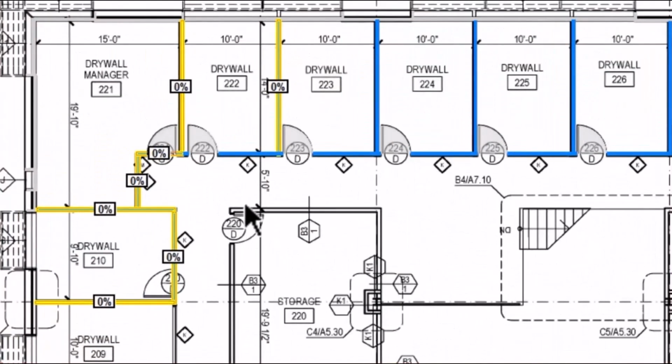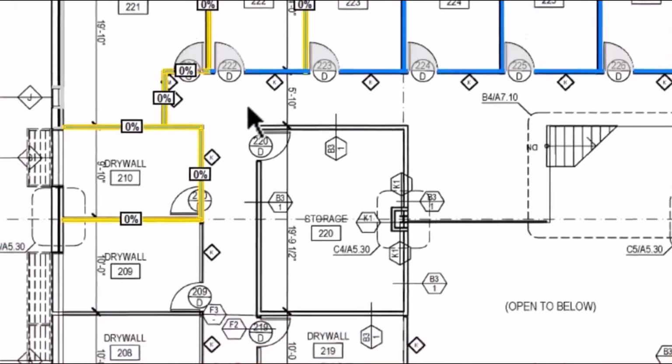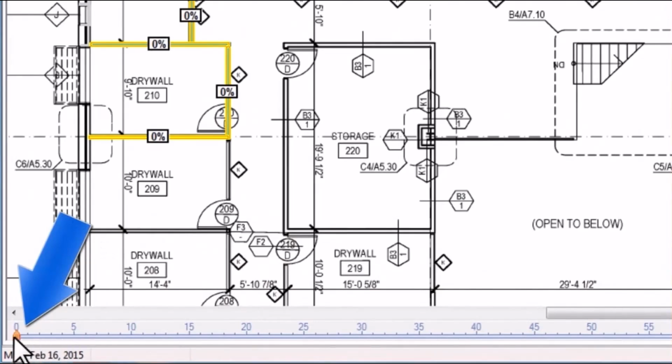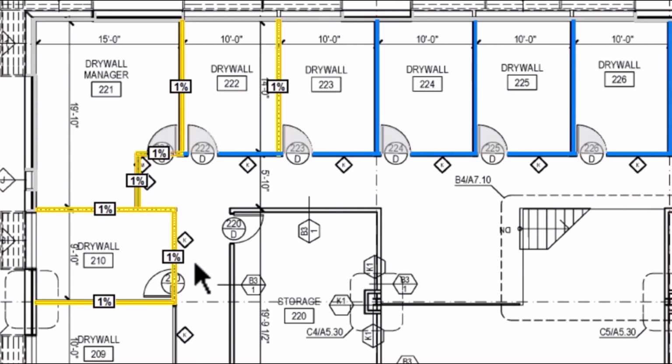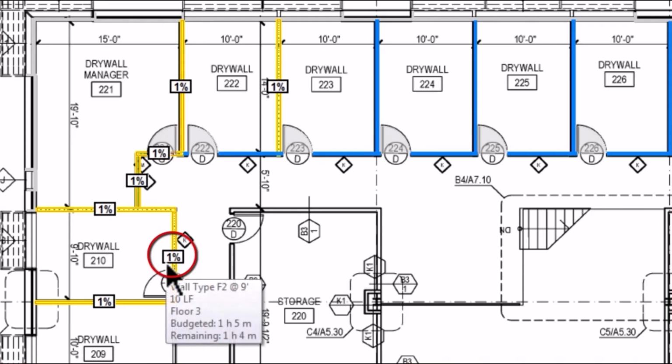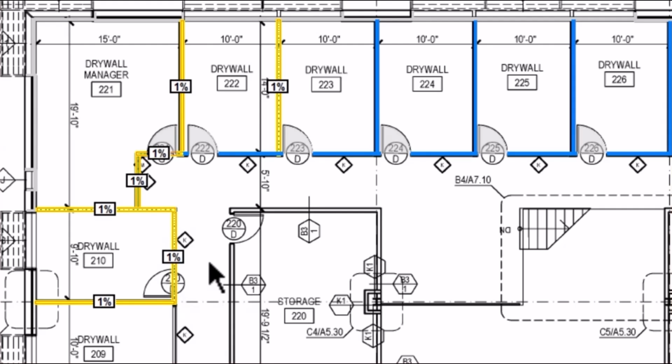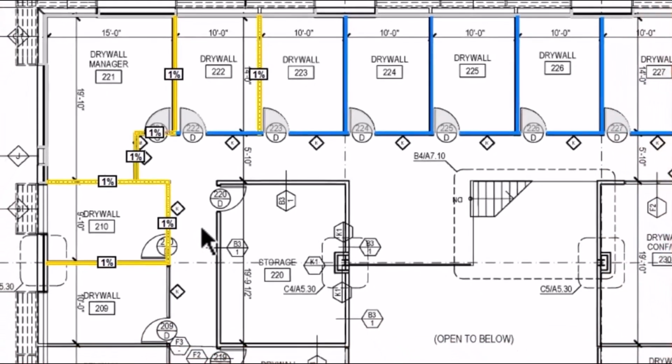Once that takeoff is selected, the foreman is encouraged to use the % slider at the bottom of the window to set the crew number. This would be for crew number 1. Note that it will show up as a %, as this tool is usually used to show % of work complete, but in this case we're using it to assign crews. The foreman will continue to go through until he's got all of the work lined out for that day.